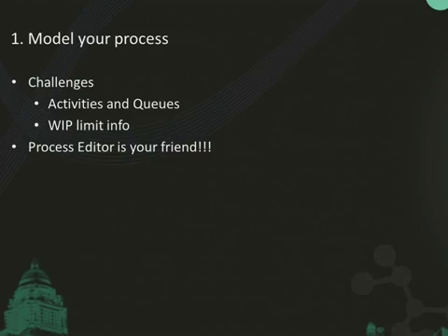So the challenge is, if you've used the Team Foundation Server process editor and you understand the TFS object model, where do you store those work items? How do you model that state flow? The obvious one is using the workflow states, and that's the way I do it. It seems pretty obvious, but there's a problem with it: you can't extend the state model in TFS